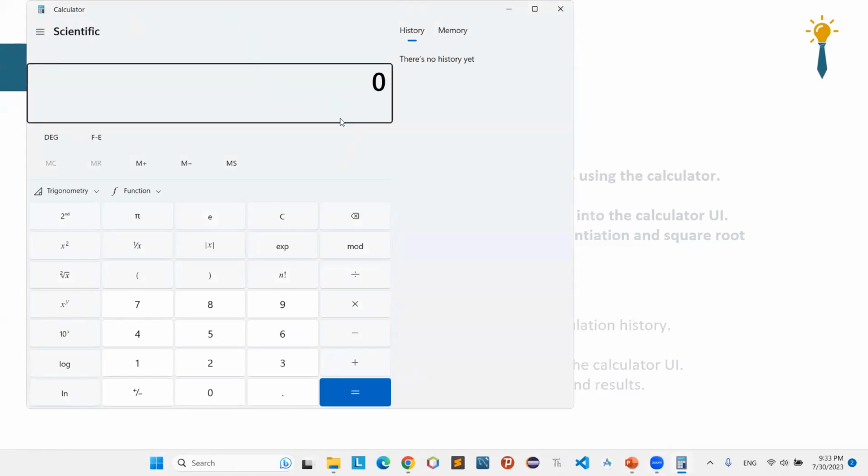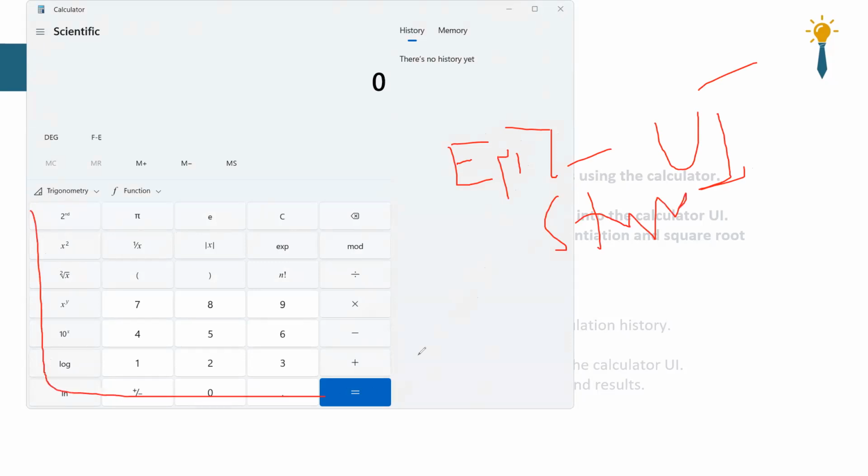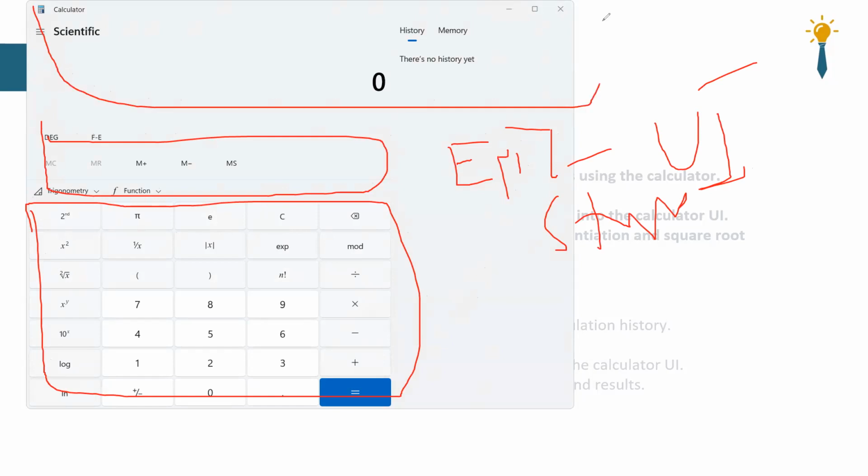Okay, so if we're going to do this project, it has this UI, okay? The UI has, for example, two parts. So epic one can be UI building. Then the stories can be these digits and numbers as story one, and the other can be these symbols. The other can be the other templates. You can break down the epic into a number of stories. These are functions, for example. Either way, you have the work breakdown structure, beginning from epic or initiative down to sub-tasks.